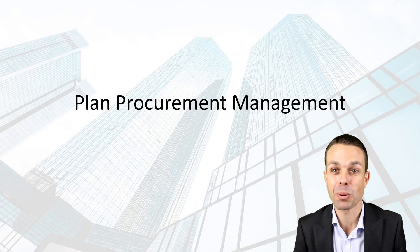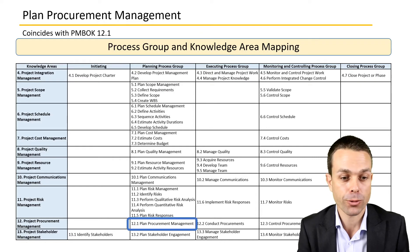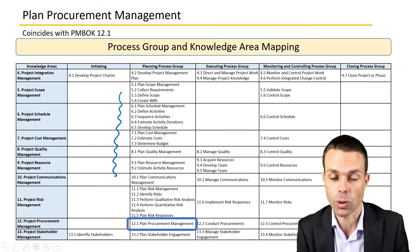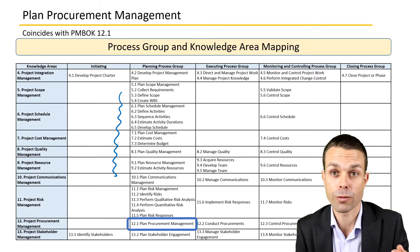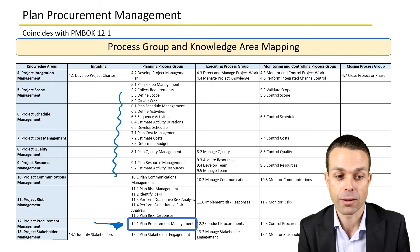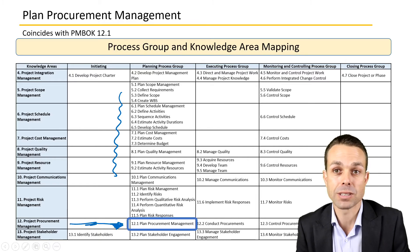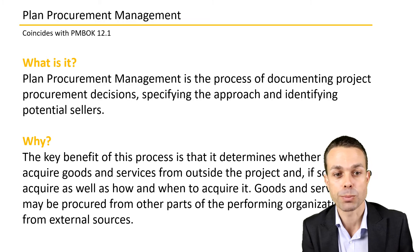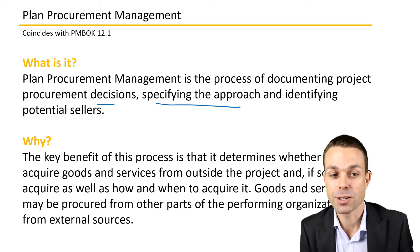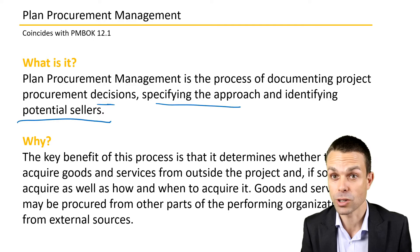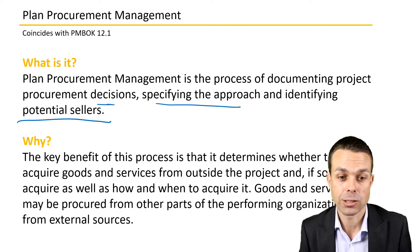Welcome back to these processes from the Project Management Body of Knowledge. We're now looking into planning procurement management. We've been through all the other knowledge areas — project risk, scope, schedule, cost, quality — and now we might need someone else to actually do the work for us. The plan procurement management process is that process of documenting project procurement decisions, specifying the approach, and identifying potential sellers. The key benefit is it determines whether to acquire goods and services from outside the project, and if so, what to acquire and how and when to acquire it.